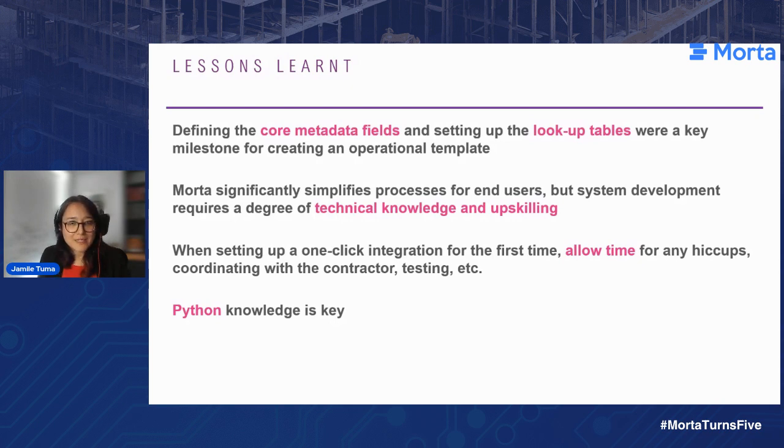Defining the core metadata fields and setting up the lookup tables were a very, very important milestone to create a template. Without those, like I said before, we would use the one-click integration to connect with one CDE, and if we started using another one, the links would break, the tables would break, the scripts, everything. So having those consistent columns that are reading whatever the metadata is in the CDE really creates this sort of plug and play template.